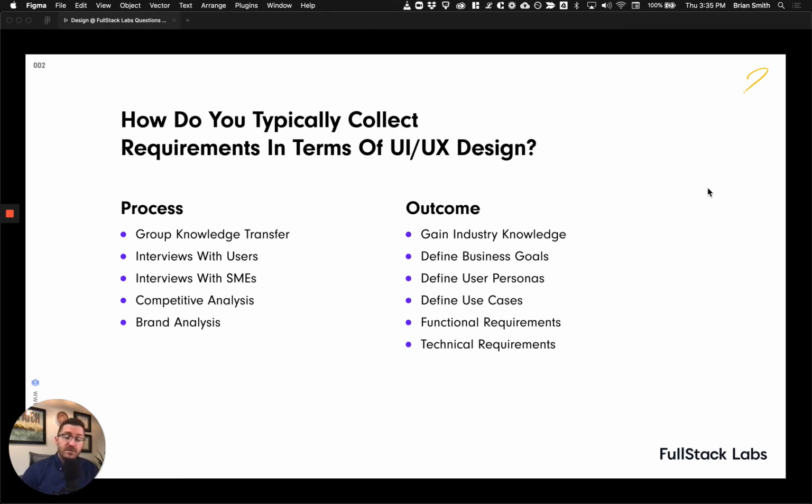We will also define functional requirements through this process. So that looks like a list of the views that will be included in the app and what can be done in each of those views. We'll take those and we will rate them based on value to user and difficulty to implement and business value. And with the combination of those, we can start to prioritize which features should be designed out first and which features should be implemented first.